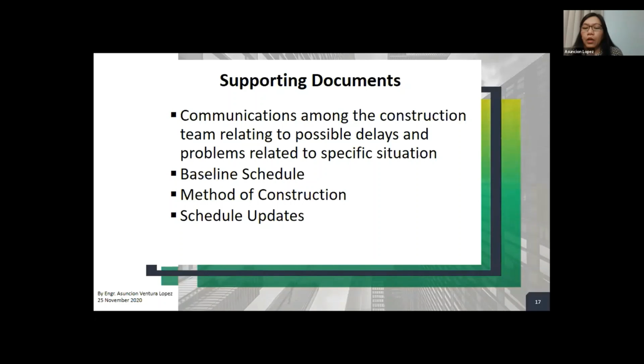These baseline or as-planned schedules are important, because they are the original planned schedule for the project. Once that schedule was revised or disrupted later on, it is very easy to compare. So you can use it for a time impact analysis, and it will definitely show the occurrence of the events and highlight the impact of those delay events to the project.